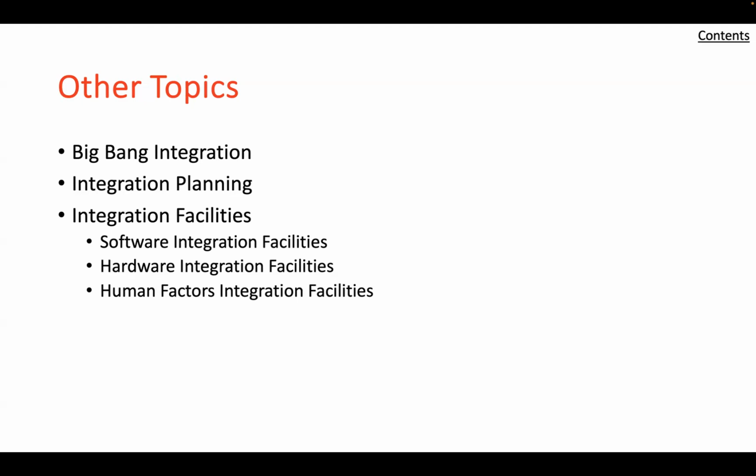Parallel integration can decrease the time for overall integration, but will require additional quality assurance resources to ensure that errors are caught and proper integration of the system is achieved. It's up to the systems engineer and program manager to determine the best approach. Other factors that contribute to the decision may include physical space to perform the integration, time and schedule constraints, and the amount of transportation of the components and subsystems, if located in different facilities.